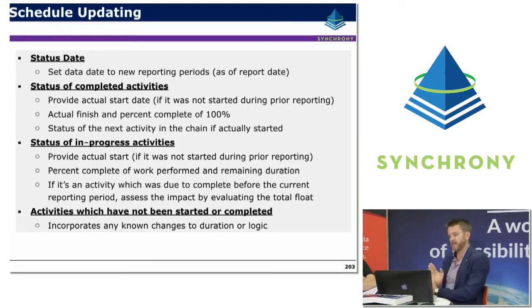These status dates are basically sweet spots in time where we say, okay, we're going to take a snapshot, we're going to take a pulse of the status of the project at these points. So status updating is never something that's just ad hoc or continuously happening live at any given moment. It's coordinated and designed to be around these particular status dates or status times.